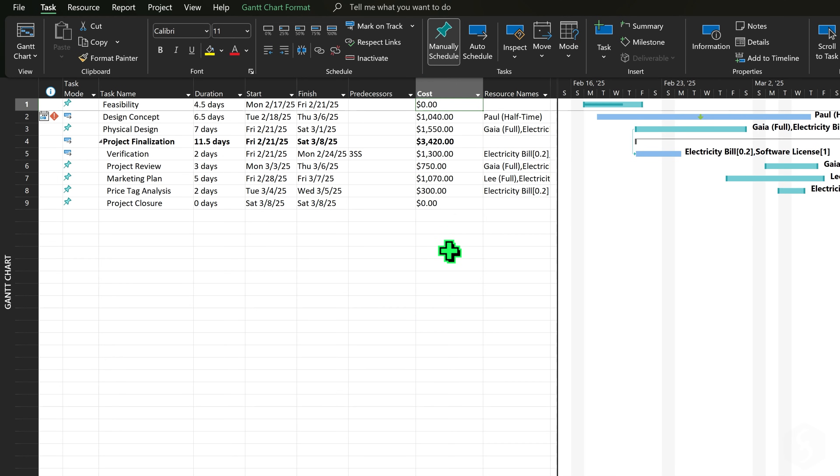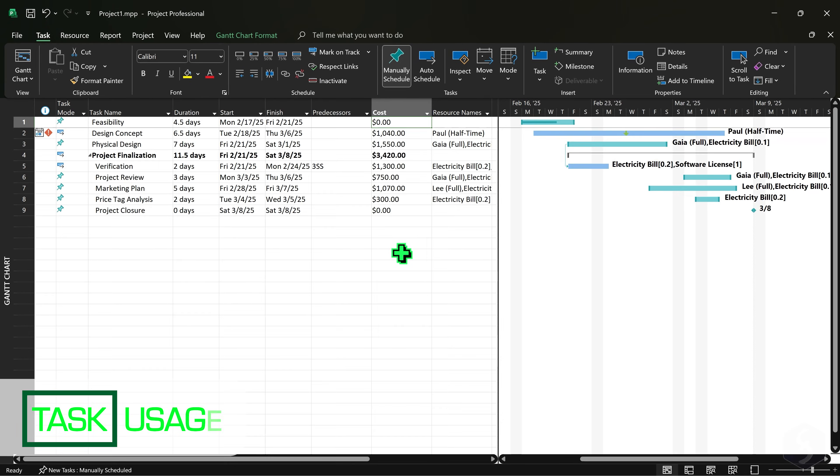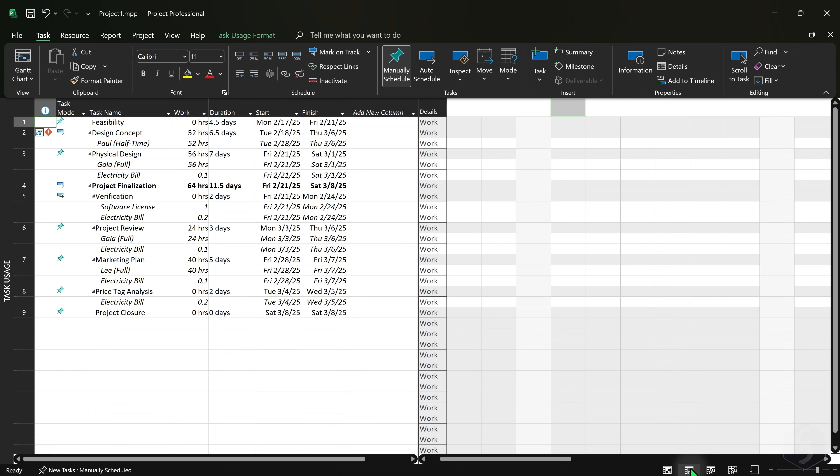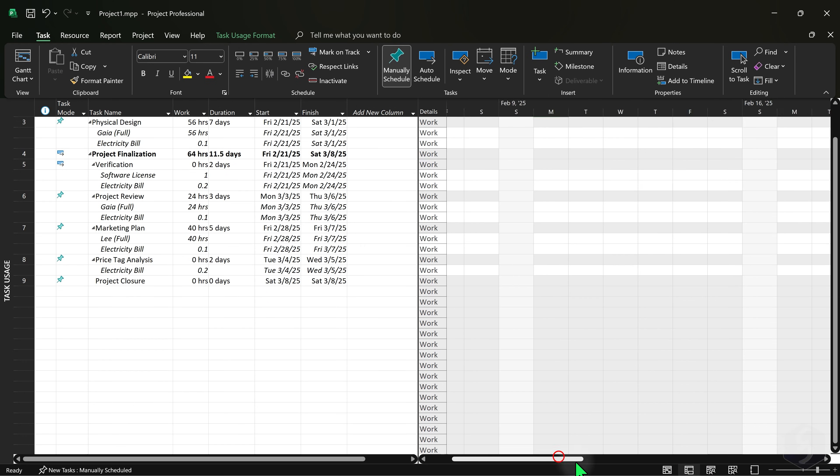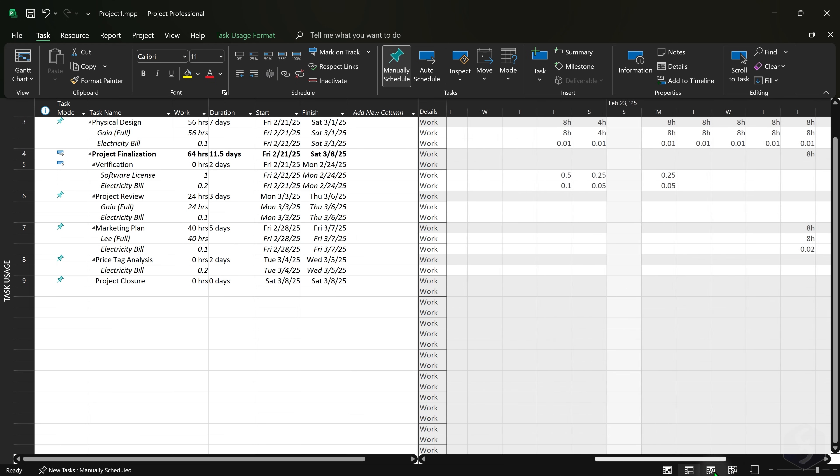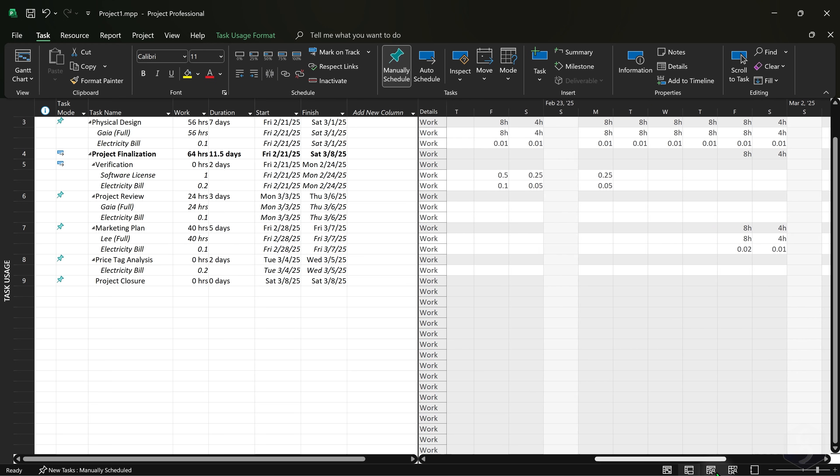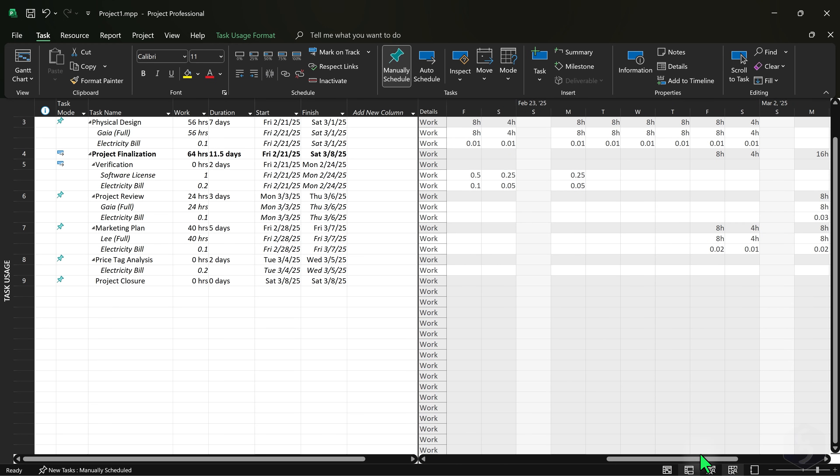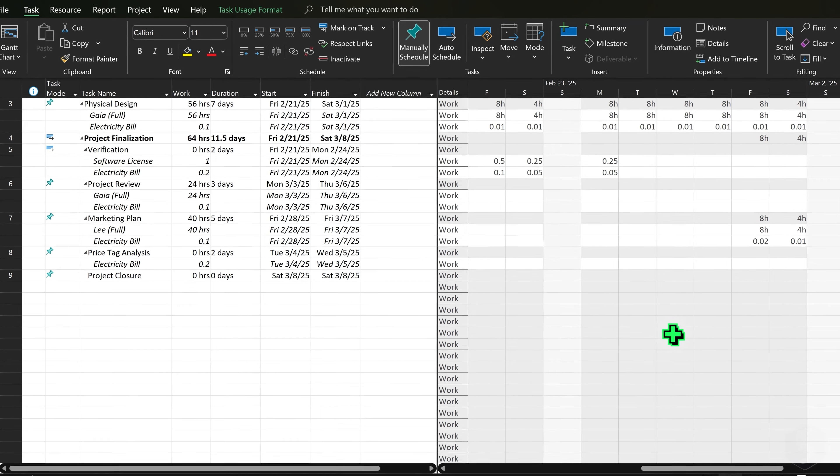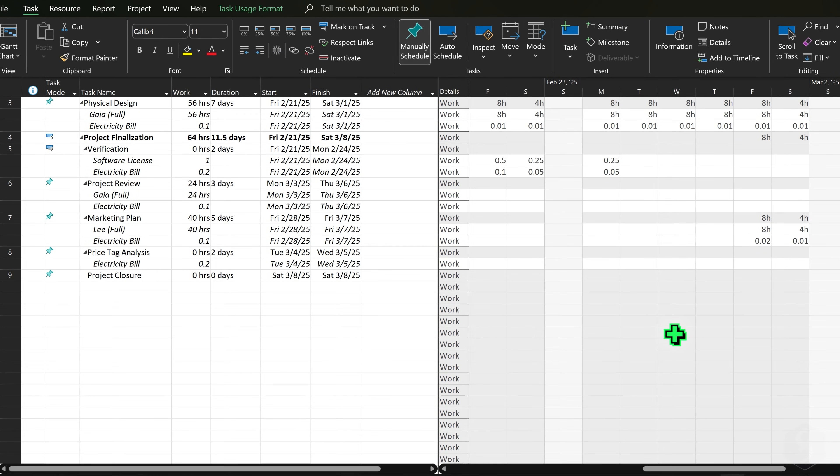To get a complete overview of your project, open the Task Usage workspace. This shows the working time and the equipment usage for each task and how these are distributed over time on the work rows.